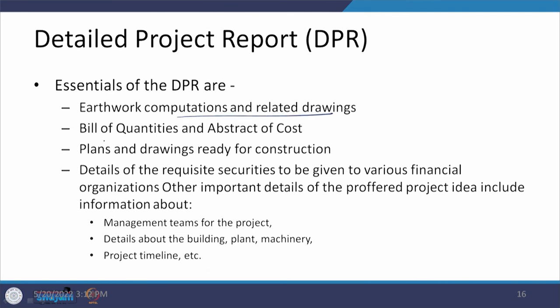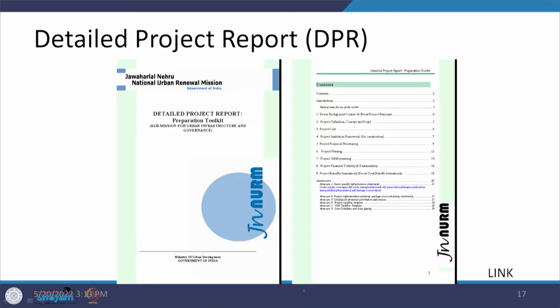The DPR also includes computations and drawings, Bills of Quantities (BOQs) or abstracts of cost prepared as estimates, plans and drawings ready for construction, and details of various securities to be given to financial organizations or the timeline management team. All of these together constitute a report which can be 30, 40, 50, or even 100 pages depending on the magnitude of the project. This is the type of detailed project report prepared under urban infrastructure and government missions, and this document is what gets used in the field for construction.